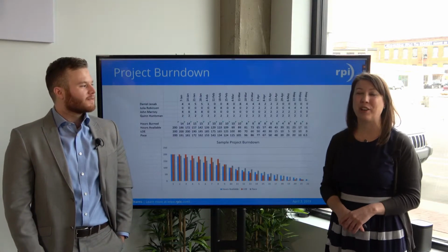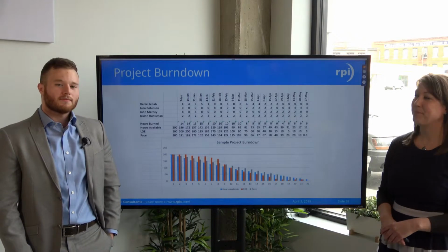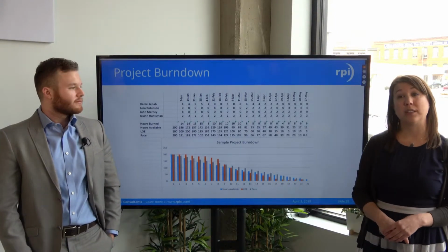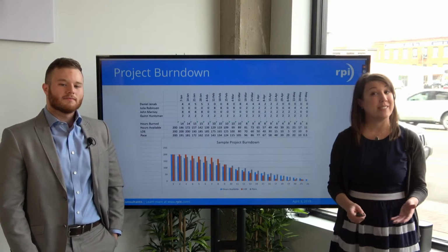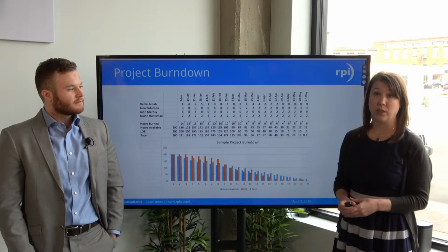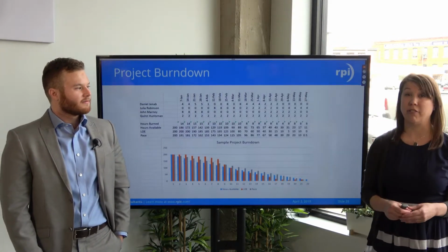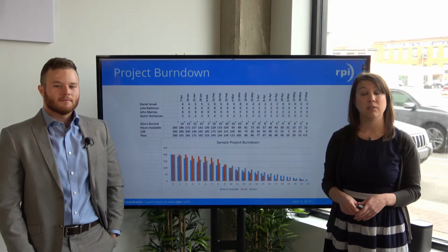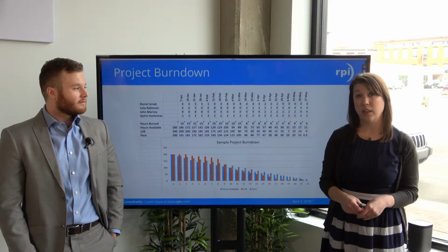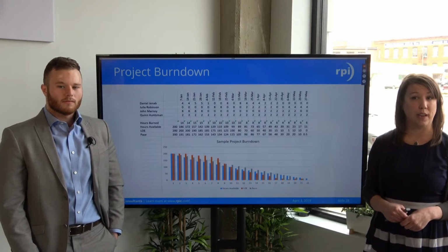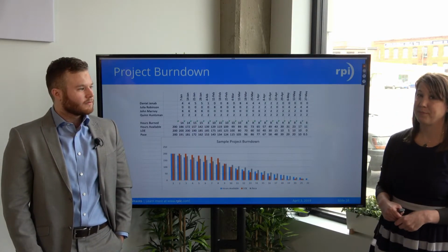So how do we use all those things that we just talked about? This comes into a project Burndown, where we have our resources assigned, weekly or even daily hours used depending on the project. We call these burned hours. The remaining budget that's available to us, and the remaining effort for all tasks in the project. These are updated each week and should align with our pace for the project, at the rate at which our burned hours and effort should follow.